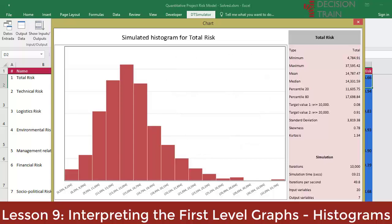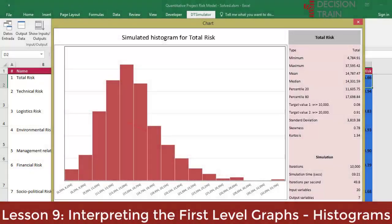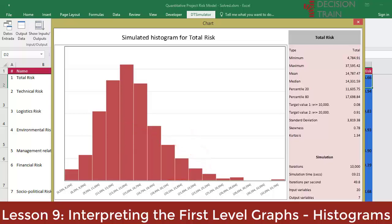Determining these probabilistic contingencies is, by the way, an impossible task for qualitative heat maps. Another way of looking at it is through target values. There is only an 8% probability that the total risk is less than $10,000. There is also a 91% probability that the values are less than $20,000. Note that there is a large tail of probability of just 9% that the possible outcomes will be greater than $20,000, up to an extreme value of $38,000 as a maximum. This very long tail consists of low probability outcomes — only 1 in 11 possible outcomes would be bounded beyond $20,000.